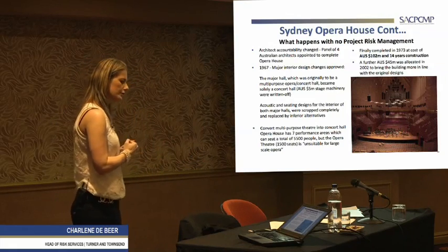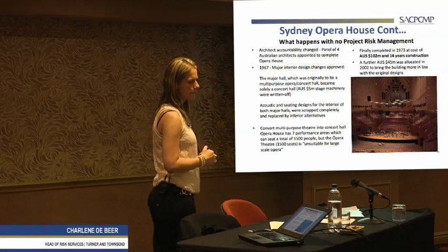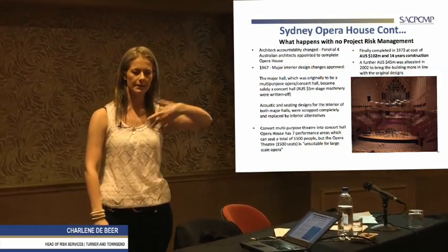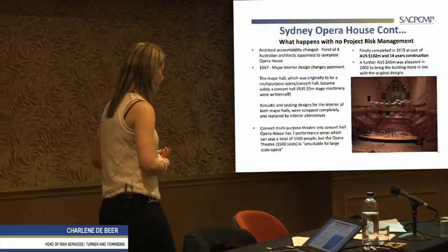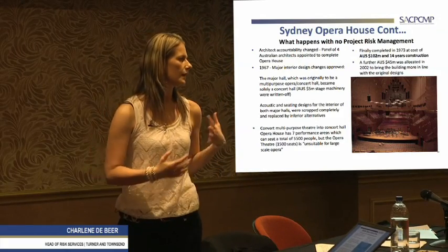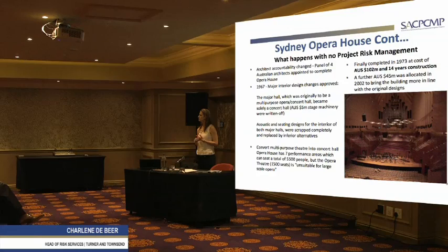Because if I would start building a house and all that needs is the roof and the chimney, and they say, well, we don't want you to continue building the house, we're going to get somebody else. And then for some reason, 5 years down the line, that structure of that house fails. And they come back to me, I'm going to say, but I'm not the last guy who worked on your house. So I don't know when they put on the roof if they've put the walls or the integrity of the walls at risk, so I'm not going to take liability. The same thing if you replace engineers on a project, you can't hold the first engineer liable or accountable for anything thereafter. That becomes the new engineer.